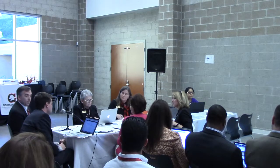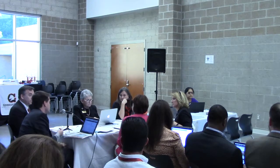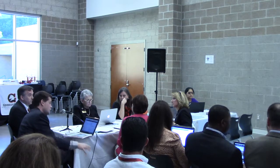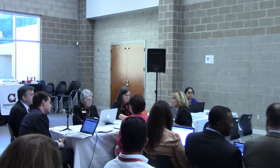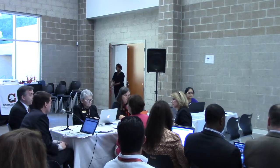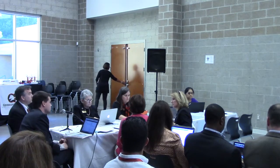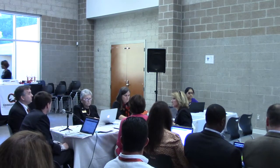When I laid out to them that this is step one, the board has to understand fully the risk involved with entering a contract, because even though they're out there fundraising and it will go through the foundation, as he said, we will be liable. This building is being built on our property, just like we're liable for what we're sitting in right now. It's ours. We will manage the architect contract. We will manage the build. We will bid it out just like we did this and we're doing an elementary school. It will go through the exact same processes, including the approval processes of the Board of Zoning and Appeals, the Planning Commission, and the Design Review Commission.